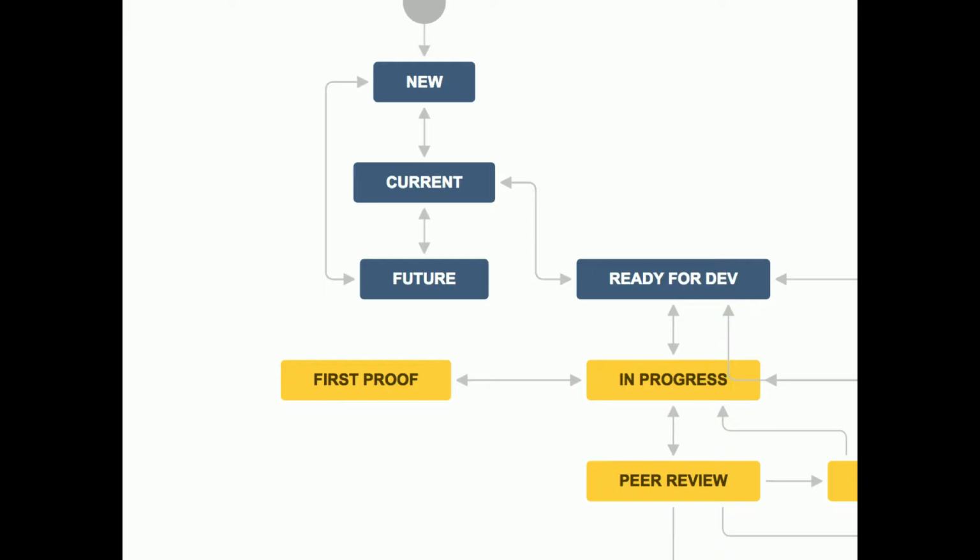Now the other change you're going to see here came about because we had tickets that were sitting in progress for too long. And so what we wanted to do was, again, to provide clarity to the client of why they were sitting in there. This specific project, as many projects have, had a stakeholder who was so busy, you couldn't really get a hold of them. It was a person that was, ping me when you need me, email me when you need me, and they're not responding. But we needed feedback from this person in order to move the ticket.